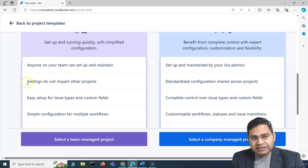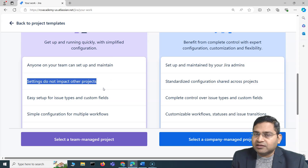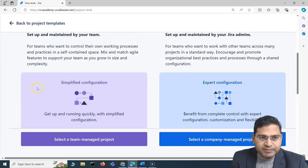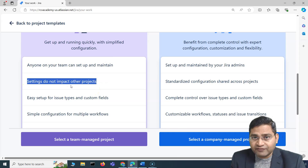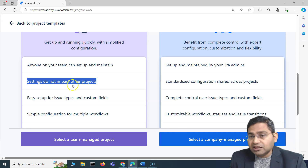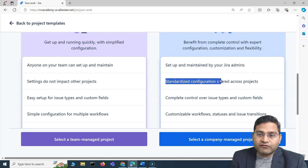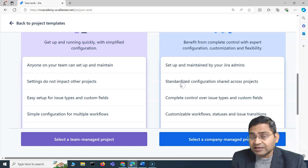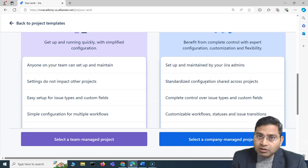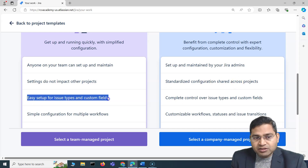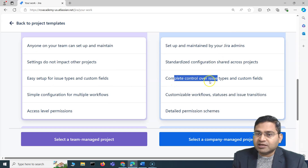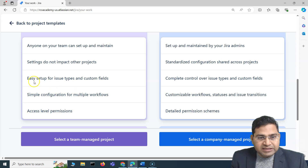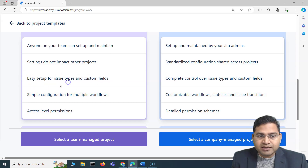These points will help you in interviews and certification preparation. Any setting you make in a Team Managed project is self-contained — specific to that project and not going to impact others. In a Company Managed project, it is a standardized configuration shared across projects, so any change will impact all Company Managed projects across your organization. Team Managed provides easy setup for issue types and custom fields, whereas Company Managed gives you complete control over issue types and custom fields.